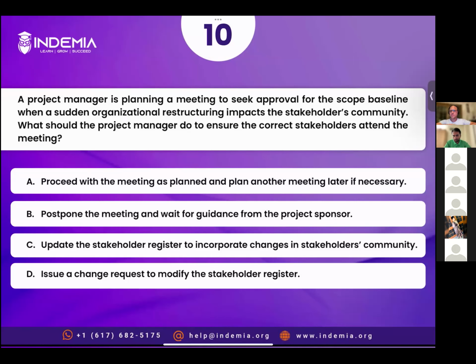So, Yusuf, you have chosen option C. Yeah, if I compare the two, I will not do a request of change because who will approve it for me? That's number one. Number two, even if I have a sponsor, we did not study the new stakeholders' categorization and other things. So I will do a request based on what? So first of all, I have to update my list and study each stakeholder, come up with a baseline, and then I propose it to the people that these are the changes.